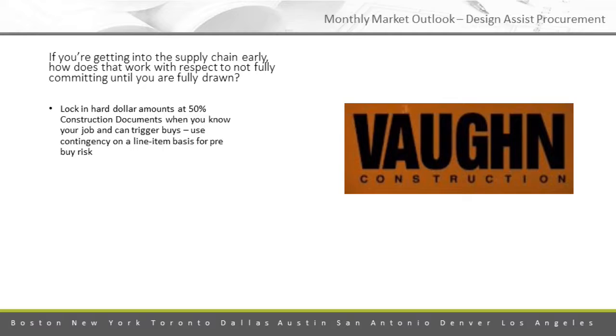I would offer that one of the things in that scenario that we're getting the design team to do is they are providing the wall tags and making sure that's all coordinated, and then we're making sure that we have a solid spec about what's required. I think the risk is low when you know your job. Right, like Blair mentioned earlier, I'm leaning heavy on our own takeoff and an internal evaluation of the subs' estimates in this case, but also in terms of ours as it relates to scope, and then bring into play past experience. And if there's issues where we feel like we have some exposure, it's allocating some funds, not with the sub, but with me and the owner, to address some areas where we feel like there could be some ambiguity and potential costs later on.